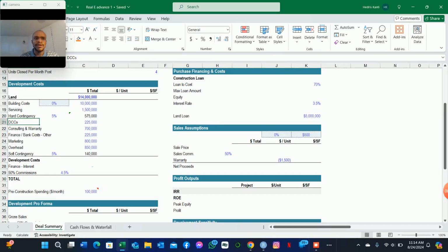It is just the development charge cost, which is a one-time cost levied by authorities to provide funds for the city capital cost. That is cost that goes into sewage, drainage, and stuff like that.